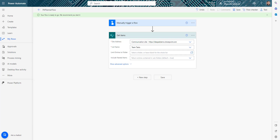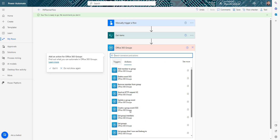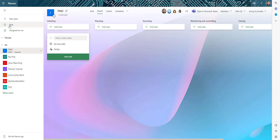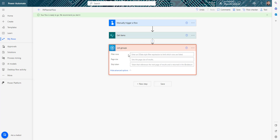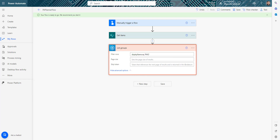The next thing we need to do is find all the plans in our Planner. When you create a plan in Planner, Office 365 automatically creates a group for it — so for PMO, a PMO group is created automatically. I'll use the Office 365 Groups 'List Groups' action and in the filter row specify that the display name equals 'PMO'. This will return the group, and we need the group ID to find the plan ID and bucket ID.